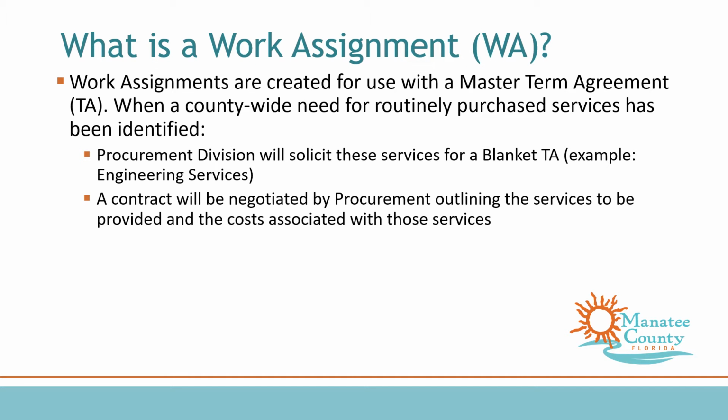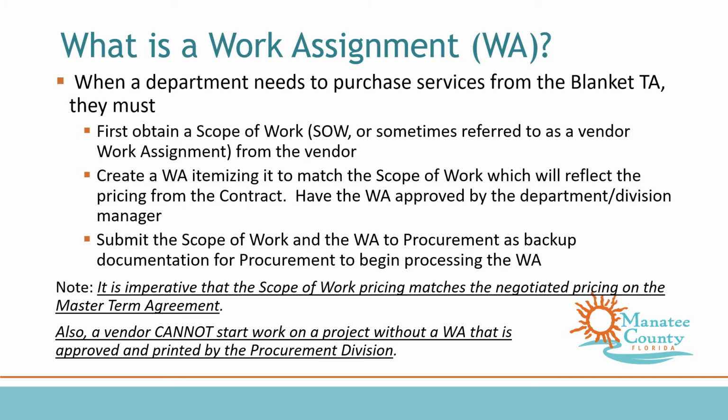What is a work assignment? Work assignments are created for use with a master term agreement. When a county-wide need for routinely purchased services has been identified, the procurement division will solicit these services for a blanket term agreement. A contract will be negotiated by procurement outlining the services to be provided and the costs associated with those services. When a department needs to purchase services from a blanket term agreement, they must first obtain a